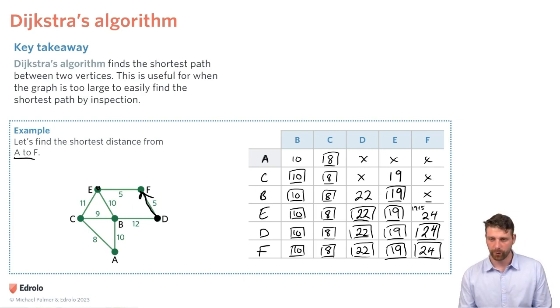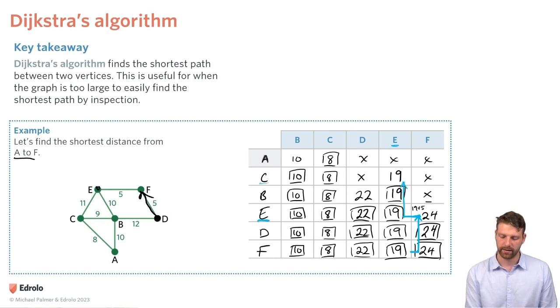All right, so if we've got to this value here for F, and I follow that path up through 24, I got to my highest 24. So I start here at F, and I travel up as far as I can see that same number. So I get to 24 here, and then I go across to whatever letter is here. So I'm going to go across to E, and so I find 19, and then I go up to my last 19, and then I've got to C. So I go across from E to C.